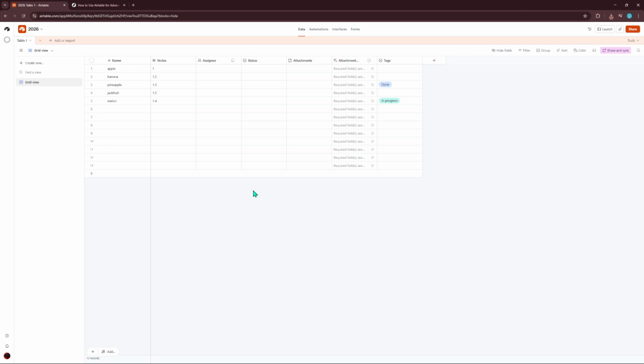Choose the right view to visualize your work. Use Grid for fast data entry and bulk edits. Switch to Kanban to manage tasks by status or owner. Calendar is great for mapping due dates and spotting collisions. Gantt brings timelines and dependencies together, perfect for planning critical paths and seeing how delays ripple through the schedule.